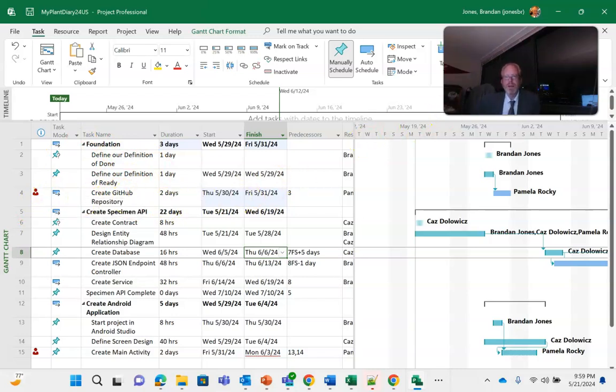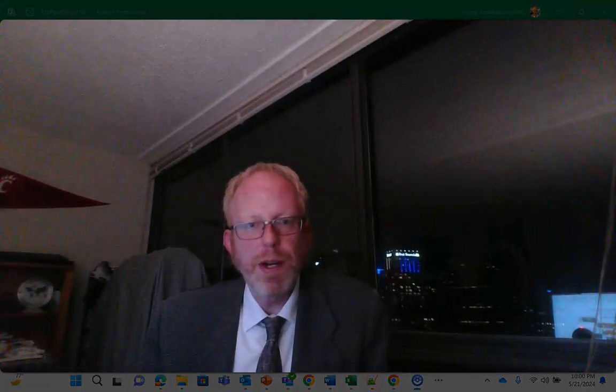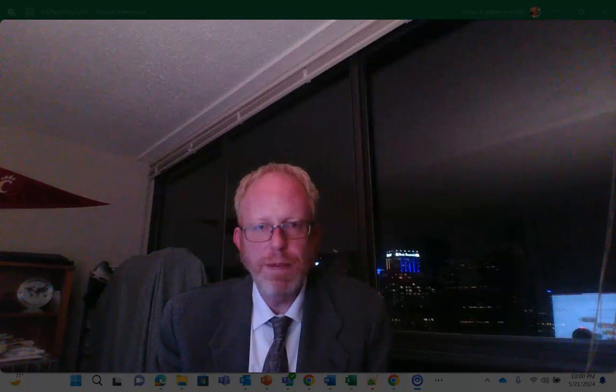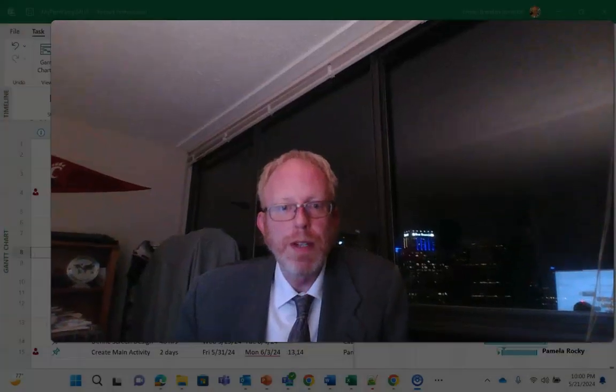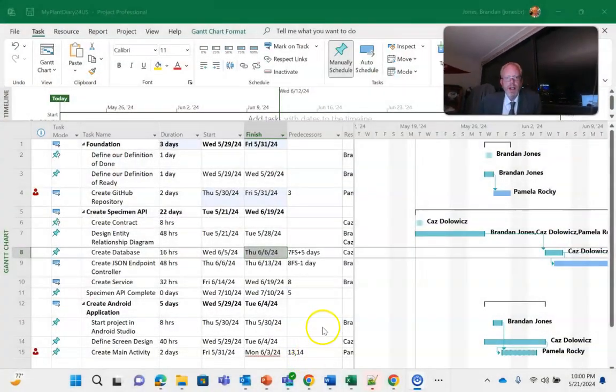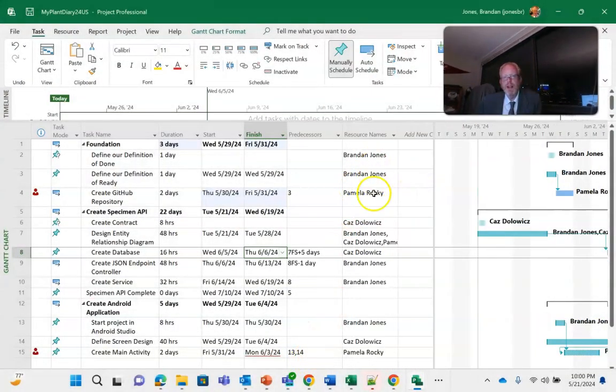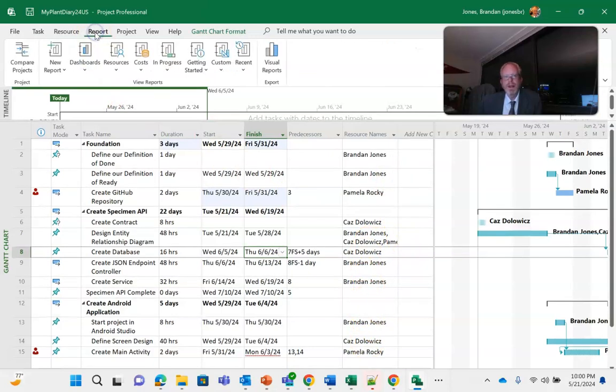So nice thing is you can always save a project, try this level resource, and then go back to your save point if you don't like it. If you don't like the results, of course the other option is to switch resources around a little bit or even add more resources. In this case because I wanted to demonstrate resource leveling I assigned myself to a lot of these tasks, but what I might do if I don't have the ability to change the project timeline.